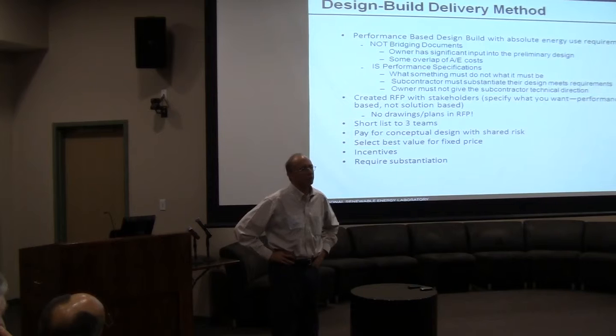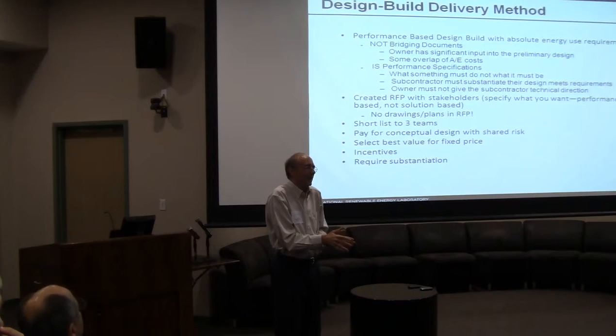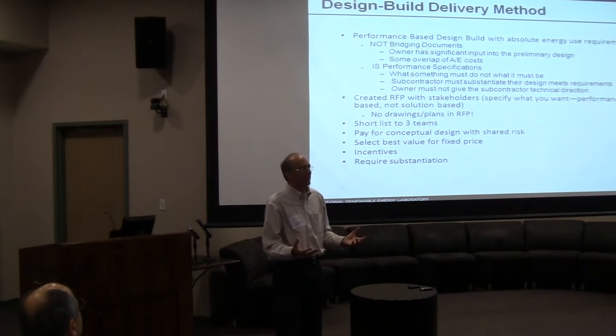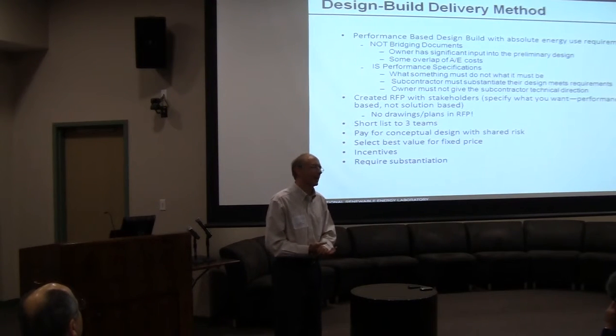From a big picture, it was things like, when they did the conceptual design, they put more money in, and we didn't pay for that design until after we were willing to pay the $300,000, but by the time they finished that 6 months, they had a lot more in it. So they had a huge vested interest to make sure they still came in at that maximum price. The most we would have been out is the $300,000, but we would have had a design that would have been worth more. And I don't know, if they had walked out, if we would have gone to a traditional bid at that, I don't know.